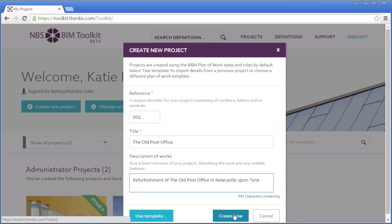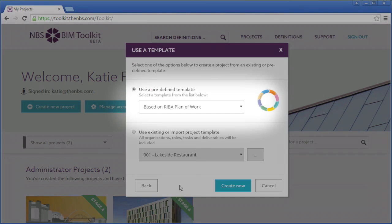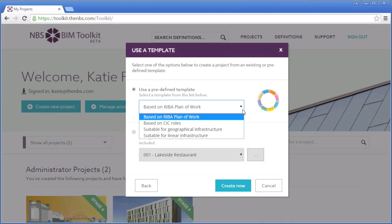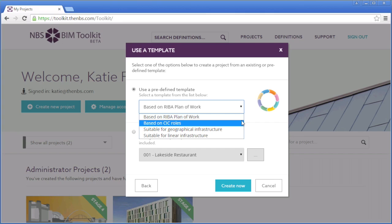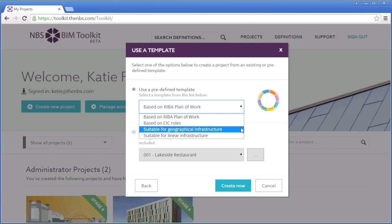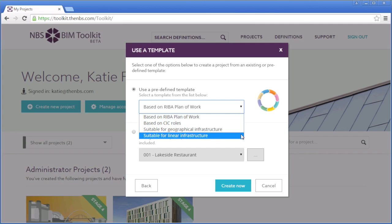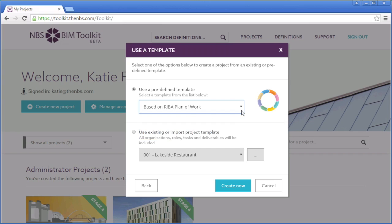Secondly, you can use a predefined template, choosing from four options. There is a template based on the RIBA Plan of Work, another using the Construction Industry Council role terminology, one suitable for geographical infrastructure developed with the support of the Environment Agency, and one for linear infrastructure developed with the support of Highways England. They differ by the pre-written tasks and roles they contain.